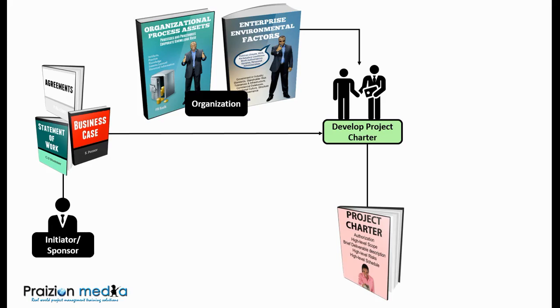There is a lot of information that could go in the charter: high-level assumptions, high-level constraints, and so on and so forth. But it's very important that we don't get carried away as we develop the charter. In some firms that I've worked with, I find them making their project charter a plan. Now, it's not a plan. It's not meant to go into detail. It's meant to be at a very high level.